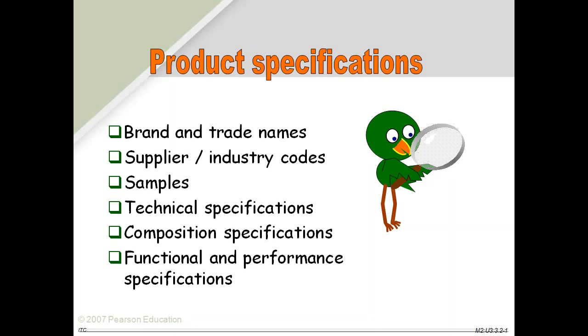I remember a case when we were writing laptop and we put down Pentium 4. Just because of the Pentium 4, we had an objection from a supplier. He said, why Pentium 4? So you can imagine these are the issues one needs to look at with brands and trade names. If you are using a brand name, we try to use the words or equivalent, until you have made up your mind. This is the standard in the office and we are going to stay with one brand. Yes, you say, okay, I have standardized on this model of a car, this model of this, then it's fine.